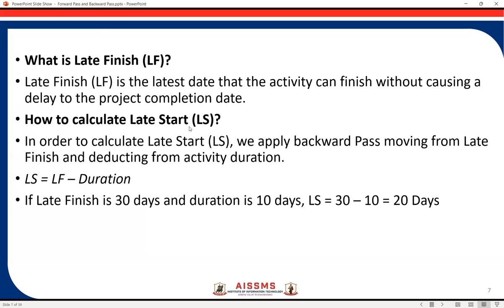How do we calculate the late start? In order to calculate the late start, we apply the backward pass technique, moving from the late finish — from the right side to the left side. In the backward pass we move right to left, whereas in the forward pass we move left to right. We take the last activity first. The early finish of that last activity is taken as the late finish time, and then we calculate the late start using the formula: Late Start = Late Finish − Duration. For example, if the late finish is 30 days and the duration is 10 days, then LS = 30 − 10 = 20 days.